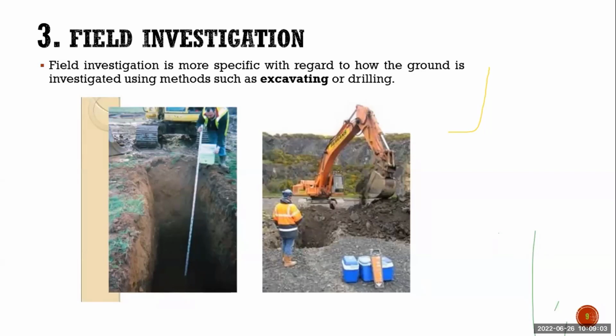See, this is my project. Propose whatever you think is important. Then the geotechnical contractor can propose directly. He will do all this reconnaissance survey and everything. Then he will propose what needs to be done, what is required for this project. Then once the client approves, then directly they will perform the field investigation. In this way also it can happen.